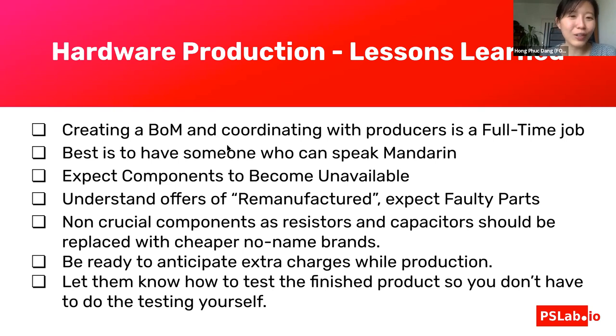And it would of course be a big advantage if you have somebody in the team who could speak Mandarin. And be aware that components can become unavailable within a very short time frame, so plan your timeline accordingly. And a few other things about the selection of components. There are also different levels of component, very good quality or remanufactured, reused components. So it really depends on how crucial a component is to your project, then you can make your decision accordingly.